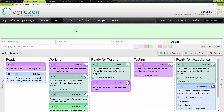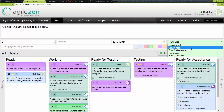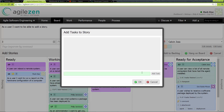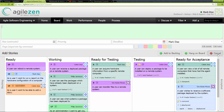Adding a story is as easy as clicking on Add and then filling in the fields that you require. AgileZen offers eight card colors on top of fields like Estimation, Priority, Deadline, and Tags. In the Add pane, you can also quickly add some more detail or tasks for stories. From here, we can then add the story to the backlog or hang the story directly on the board.